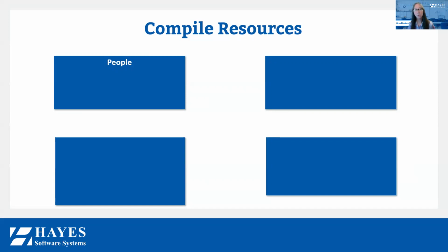What is it that they do at each site? And is there a way that we can define what each role is at the site? So let's say we had a team of 3 people at each site. So we have the team lead, and that person is the one that makes double sure that everyone on site knows the schedule. That team lead also puts together a map of some sort to help the scanning teams know where they're going, because we can assume that we're going to have someone in the building that's not as familiar with the building to be able to just come in and take over.